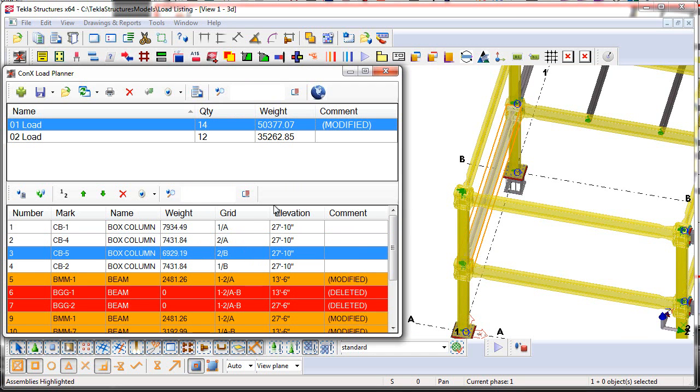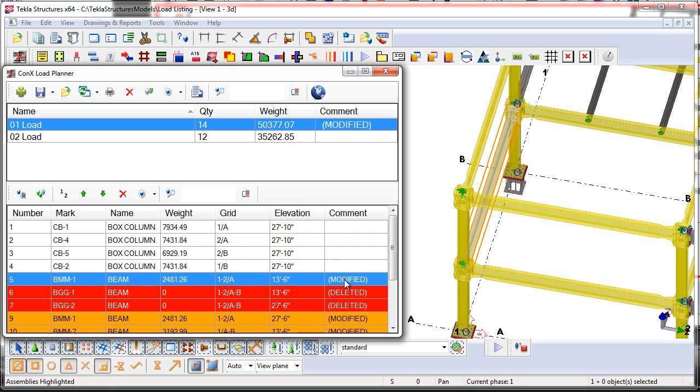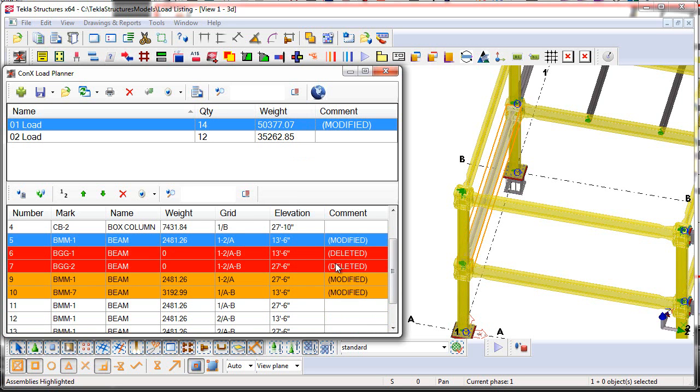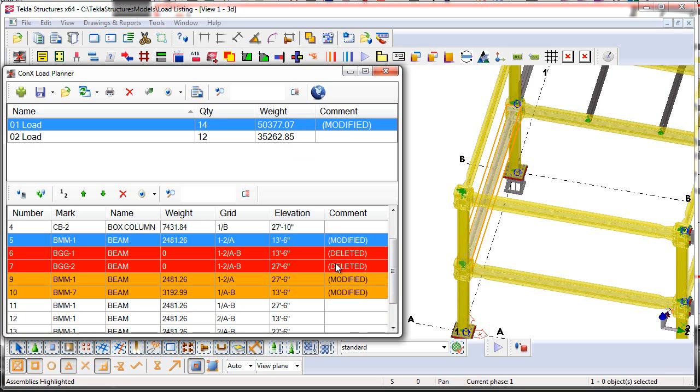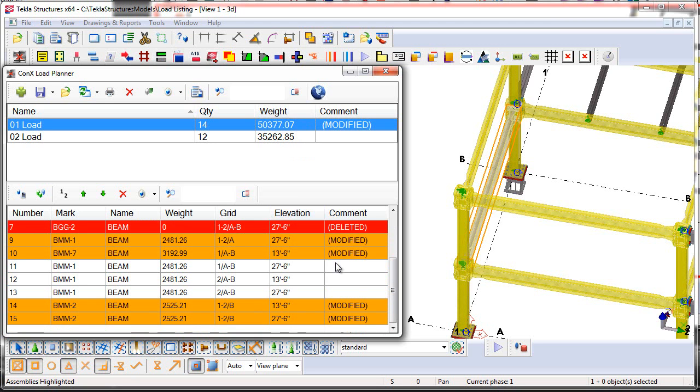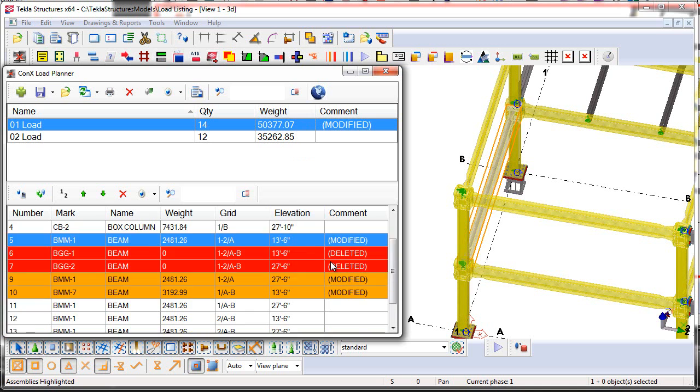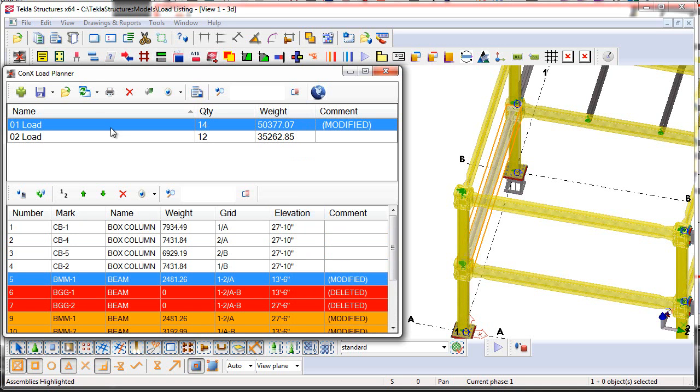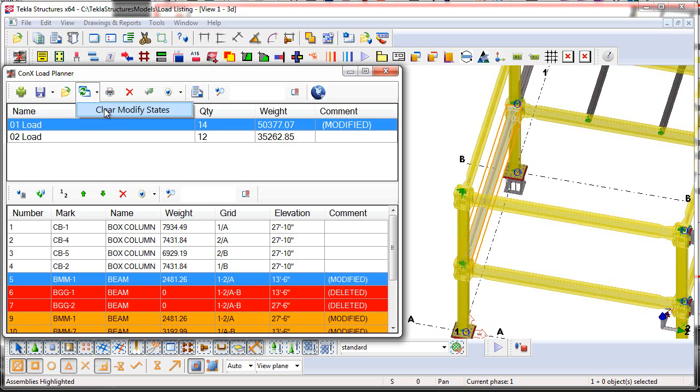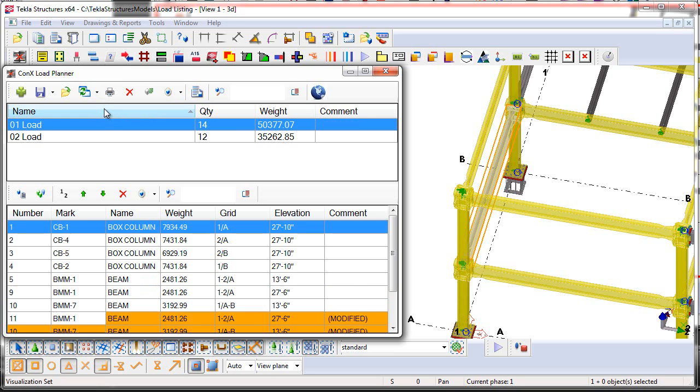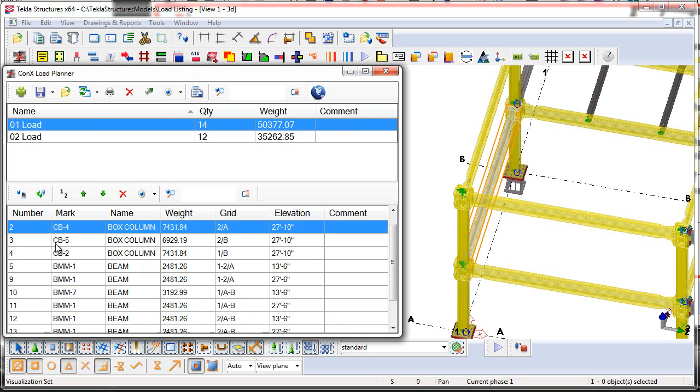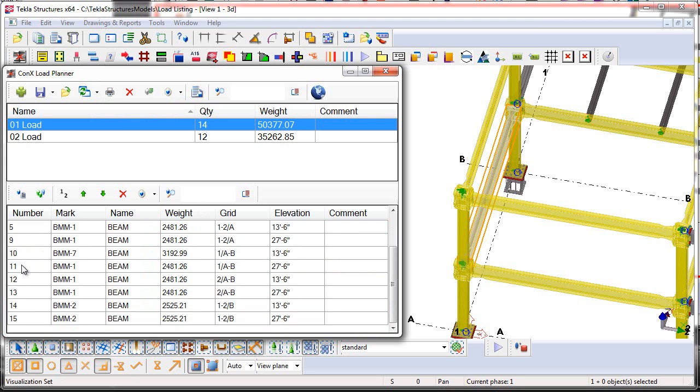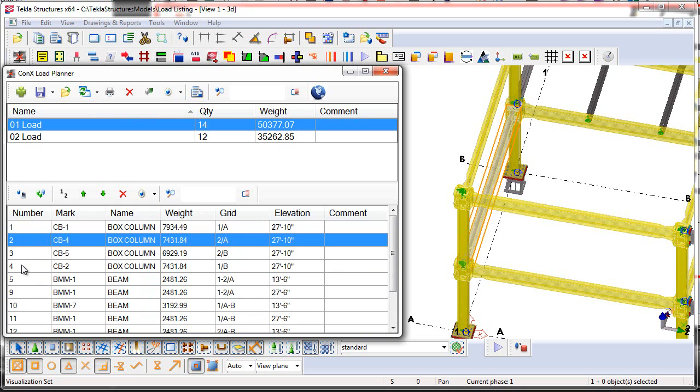Alright, now what you can choose to do is you can either print out the reports again and have all of the modified and deleted tags on them, and that might be handy for the shop if they're already processing things in fabrication and they need to understand how to modify or change the loads. Now once you've dealt with these changes, you can come up here and say Clear Modify States, and that will then remove all the modifications, as well as remove the deleted assemblies here from the list, which will then create like some gaps in the numbers.